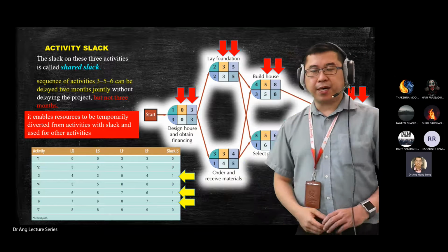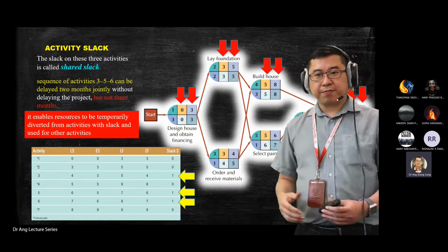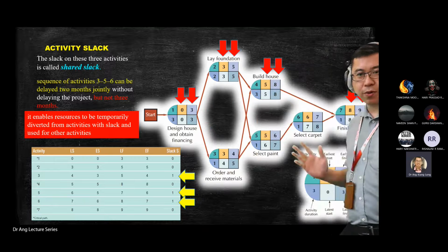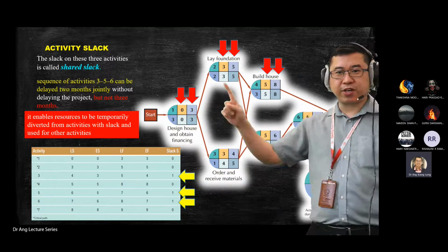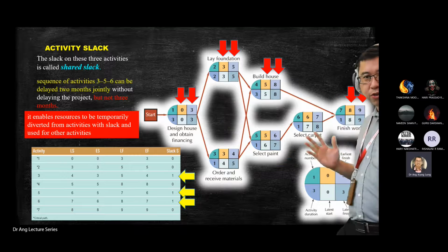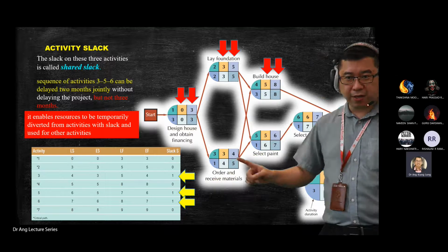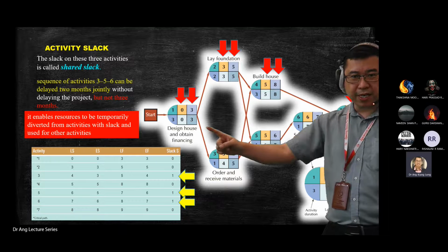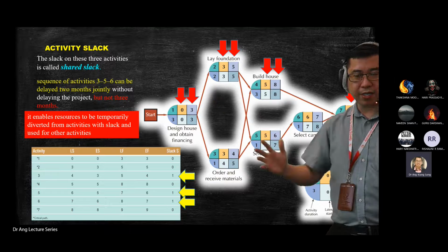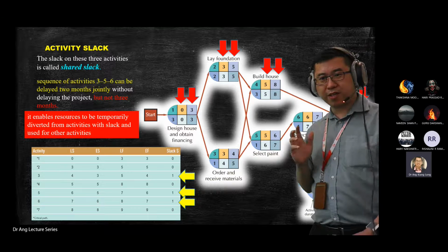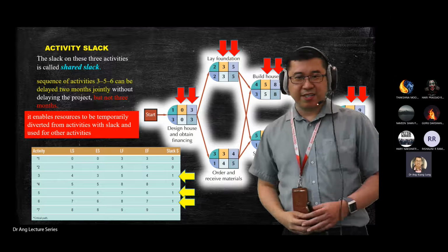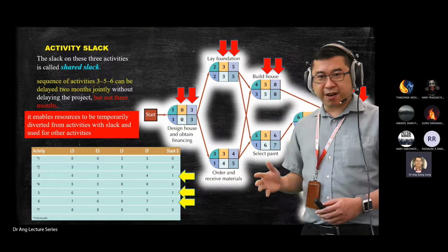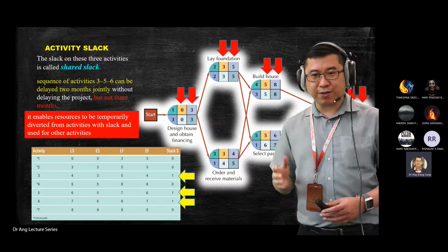Okay. So as a project manager, it is not good if the whole network is critical path, meaning the whole network that you build has all the same numbers. This one same, this one same, this one same, all the metrics here are the same. Then it is not good project planning. It's not good project management, because if every activity is critical path, you're going to kill yourself, right?